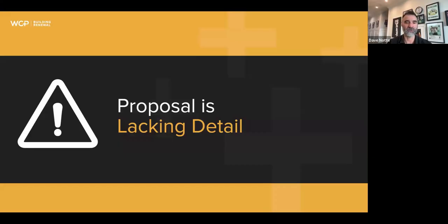And if it's saying after all this work, look, this proposal is lacking key details, probably toss it out. Especially if it's the low bid and it's missing details, you're asking for a world of hurt if you're going to select that one. At the very least, it's going to prompt you to pick up the phone, call the contractor, and say, "Hey, are you sure you're looking at the right building here?" or whatever it is. Yeah, so just a big heads up for you there.